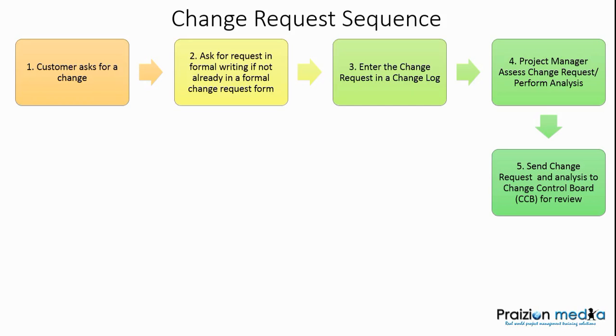The change control board is talked about in the perform integrated change control process. So right here, as we have the change request coming into this process as an input along with the analysis, it will be reviewed by the CCB, and the change control board will spend time taking a look at the analysis that the project manager handed in, along with the change request.